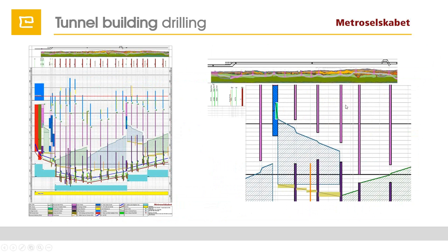For each station, they made a plan in a traditional way, in a CPM Gantt chart-based system, but we were updating the milestones in each of these, in this case, MS Project files. So we could easily get the interaction between the linear and this stationary work.